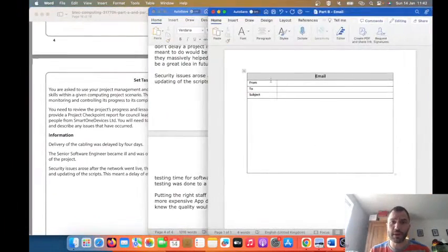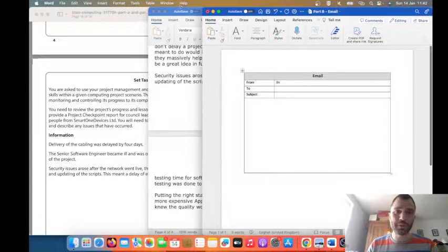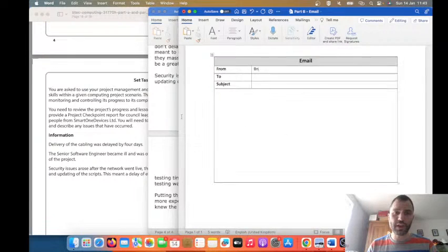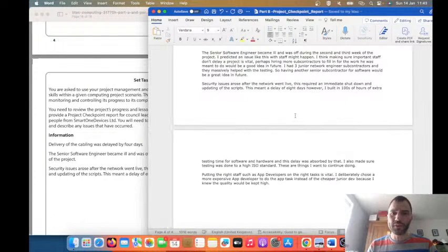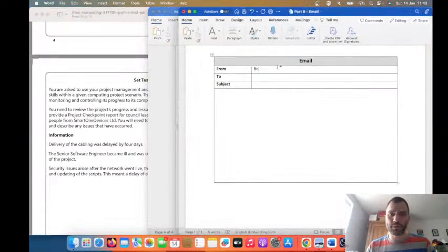So then we get onto the email. You've got 2 hours; I've spent about 1 hour on this. This should be fairly simple because we've written a lot of stuff in our checkpoint that we can reuse. The email should start with a summary of the whole project. Then you should list all the tasks, which you can copy from your PID, start and end dates, and costs, and any delays.